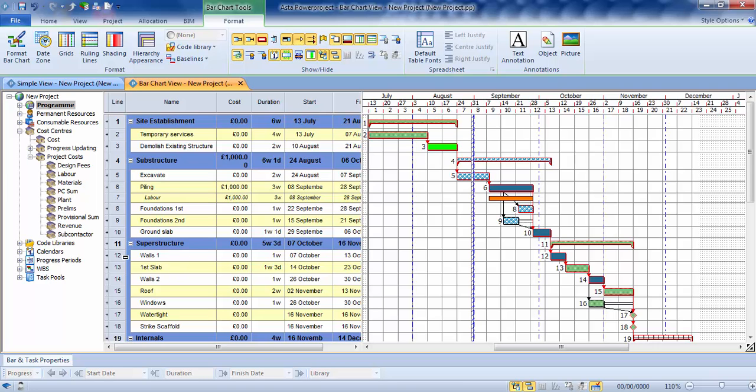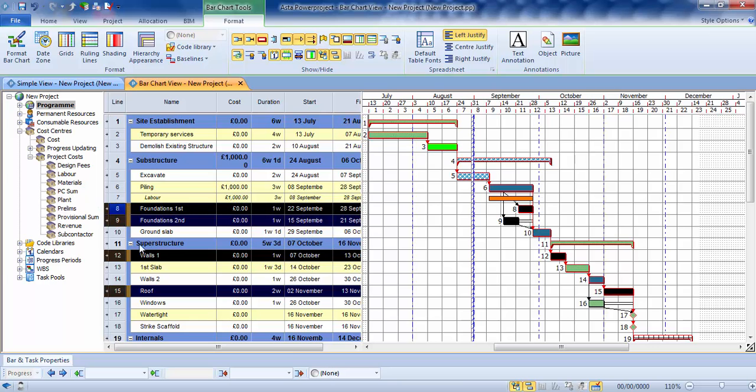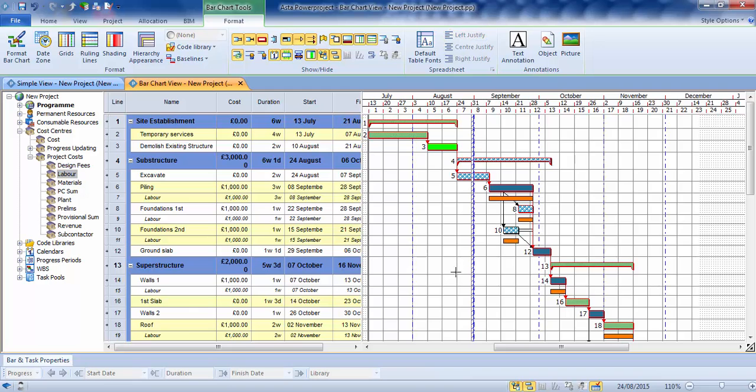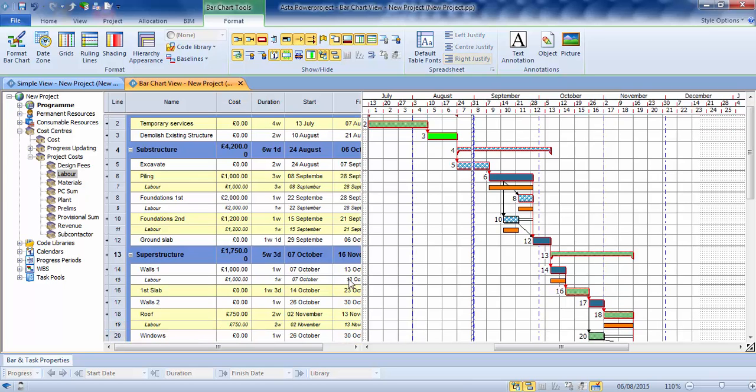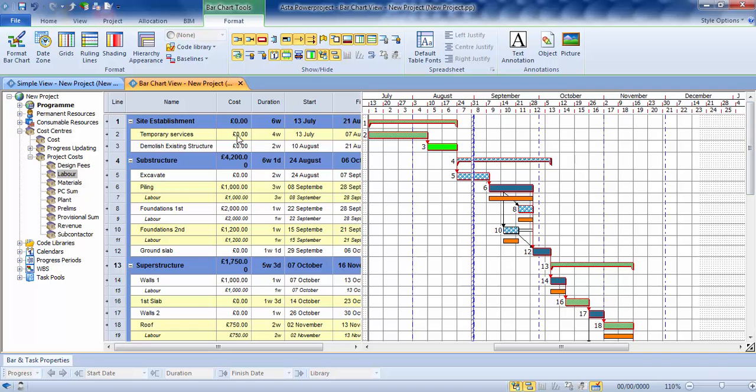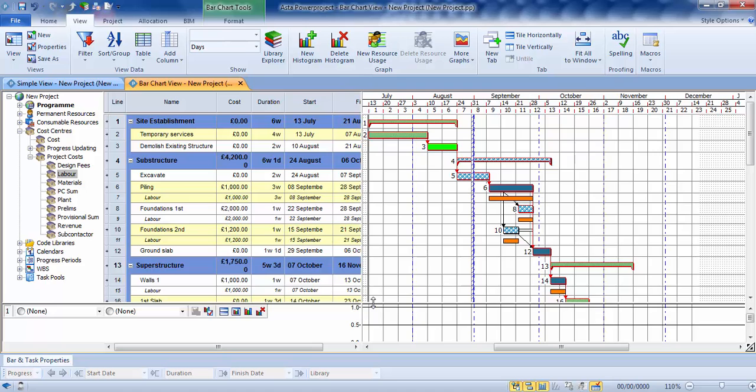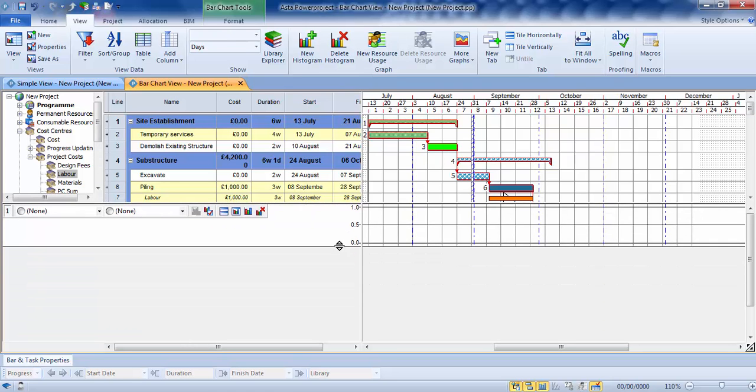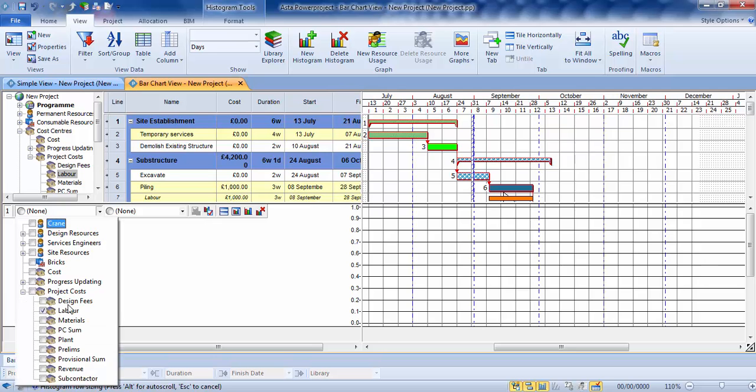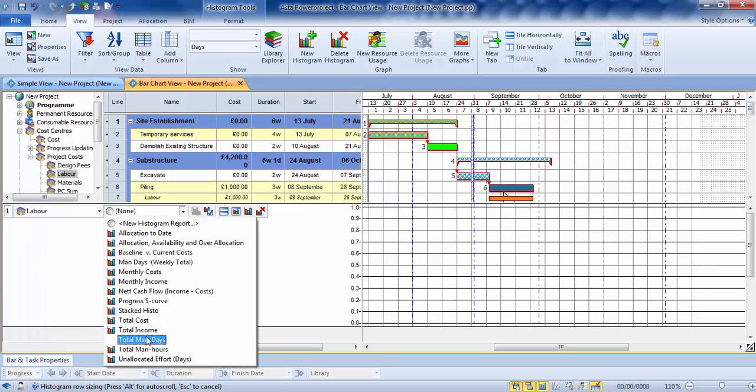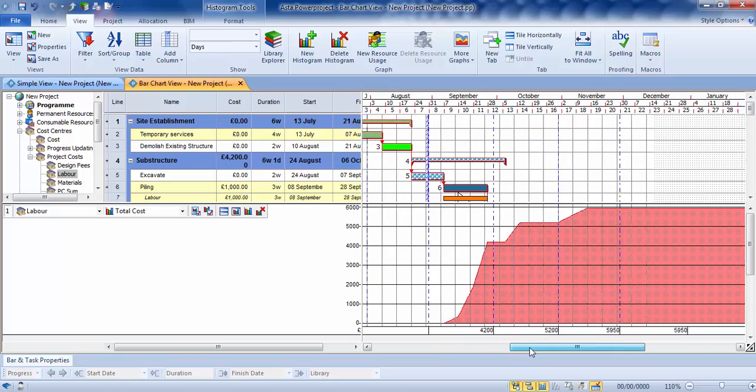If I'm allocating to more than one task, I'll just pick a couple of these for examples. Allocate labour across. Drop onto the task. And then type in the amounts into here. So we said, 2,000 on there. And we'll have... And then just change this one here as well. OK. Now, that's what we did with our resources. We can also graph our costs. So same place, up to the view, a new histogram. And then down the bottom here, we have our histogram. And from the two dropdowns, I can choose my labour cost. And then from the graphs which are available here, I can go with the straightforward total cost cash flow. And there's my cash flow running through the program.